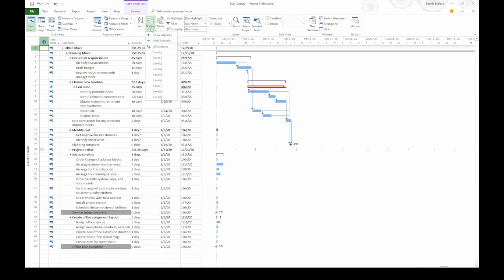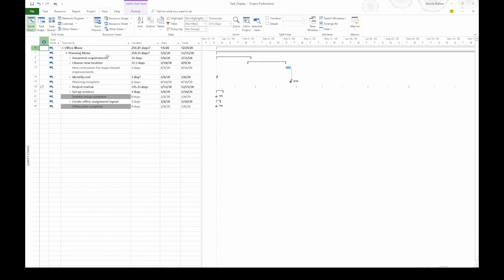If you just want to see, let's say, two levels, choose Level 2 on the drop-down list. That way, you'll see everything down to the second level.